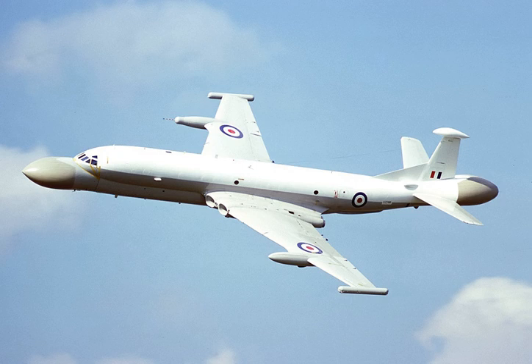The thinking behind the attempted development of the Nimrod AEW was to maintain Britain's position at the forefront of radar technology as part of defence. However, the complexity of the AEW requirement proved too much for British industry to overcome alone. A major project management issue was the appointment of British Aerospace and GEC Marconi as joint programme leaders, which meant that as development issues arose, the companies had a distressing tendency to blame each other rather than resolve problems, while British Aerospace fulfilled their half by delivering the aircraft on time, but GEC were unable to solve the difficulties in developing the avionics.